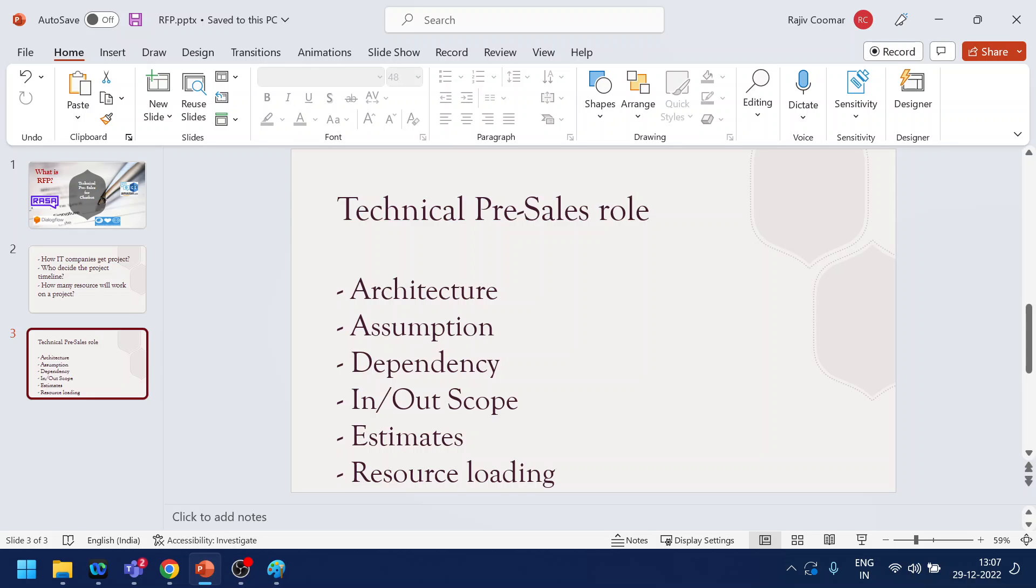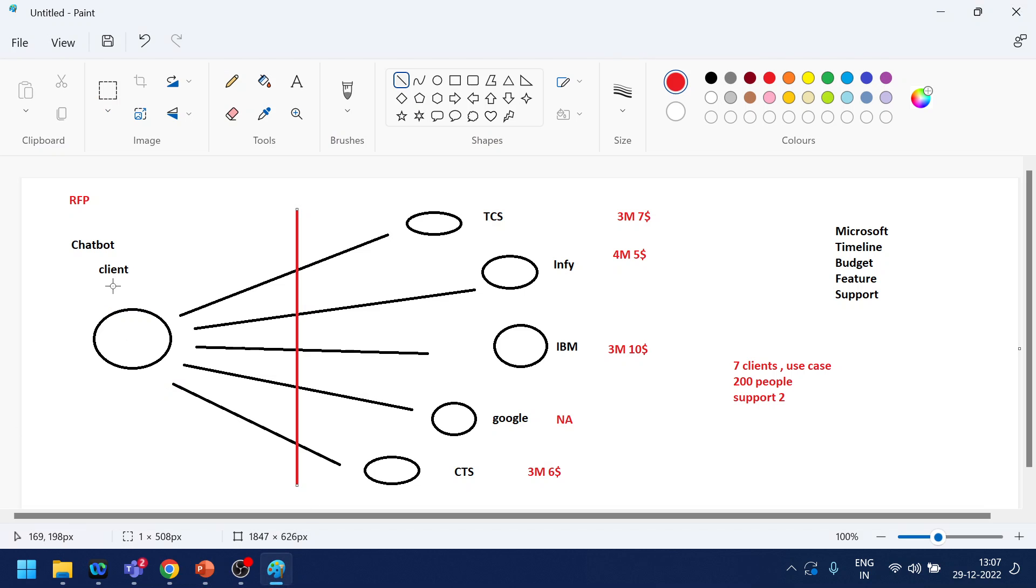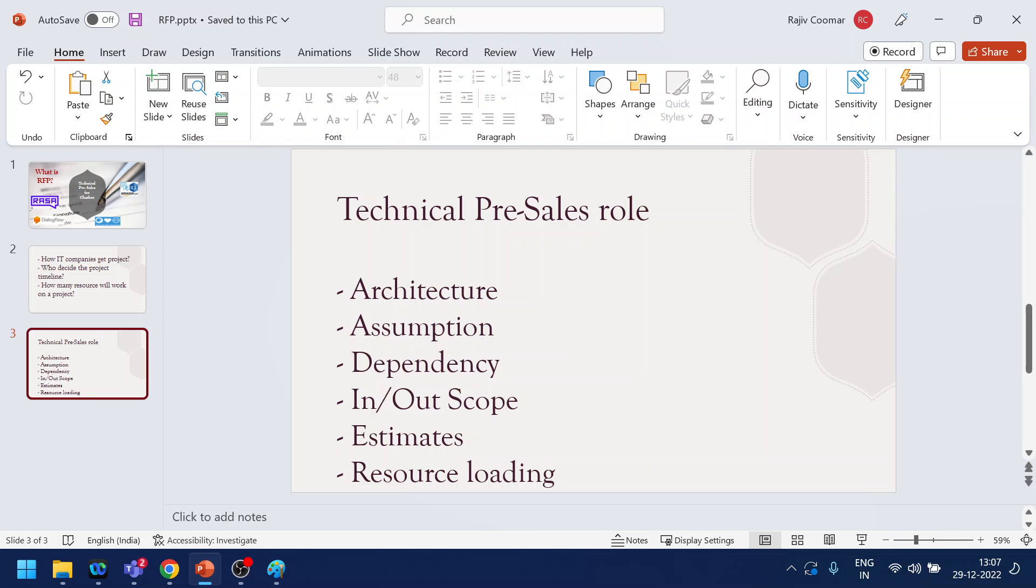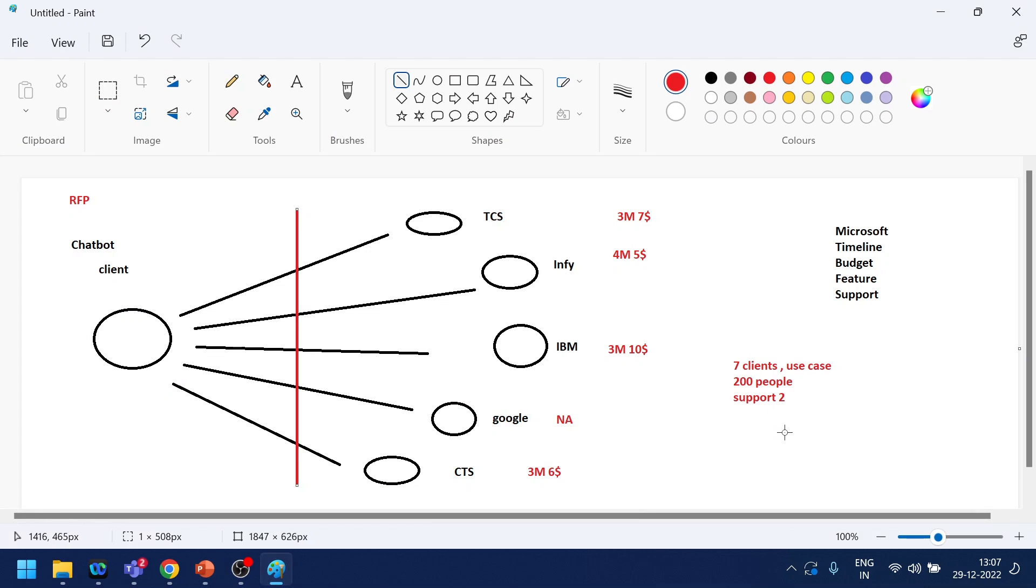Then there is three-point estimation, which basically, for this requirement they just mentioned chatbot, they didn't mention how many use cases, how many call flows to define, how many intents will be there, how many languages. So what we will do is make our assumptions of simple use cases, medium use cases, complex use cases, and then we will average out all this and based on that we will provide the estimation. Then there's also expert judgment. Let's say a particular company already has delivered a few projects, so they have some subject matter experts who can confirm what are the previous learnings they have gone through while deploying or developing a particular solution, how much time it has taken and all those things. So they can use the previous information or the experience from past projects.